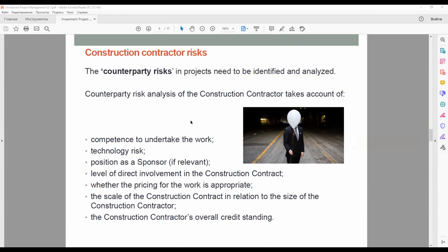A construction contractor acting as a sponsor, that is, also the construction contractor, has an obvious conflict of interest between this role and that of the investor in the project company. The risk of inappropriate contractual agreements or less than rigorous supervision of the construction contract is evident. And lenders therefore have to be satisfied that the EPC relationship is on an arm's length basis.